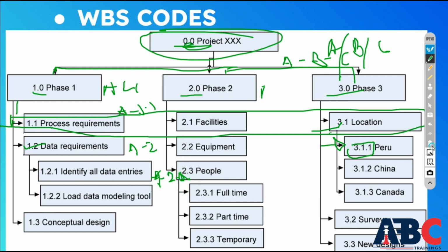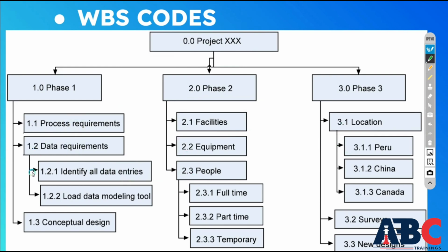In that way it describes the project, that in different projects subsequences, sub-projects or subtasks are given. So to define it we use WBS codes, which can be numerical, symbols, or you can assign them in small or capital alphabetic letters. So we call it creating the WBS.